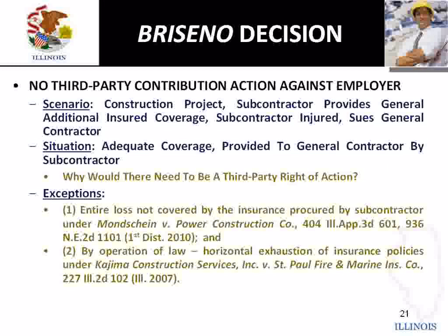And so basically, if there's a Kotecki waiver on a $6 million judgment, it doesn't matter. You're not exposed to $6 million. Brazino comes into play then, as long as there's an insurance procurement provision. And a lot of times when there are these Kotecki waivers in the contract, these are sophisticated parties, and you can bet that there are insurance procurement provisions in the contract.